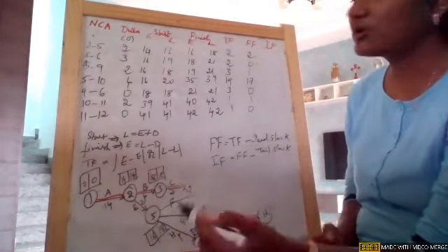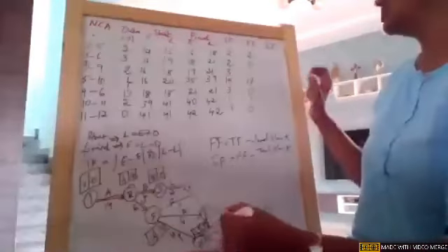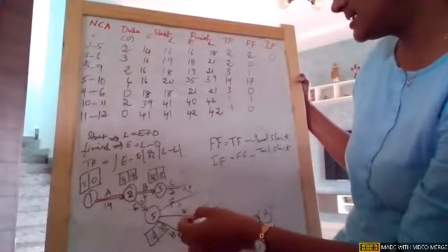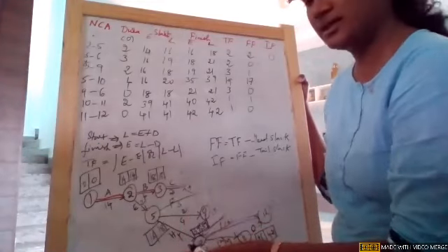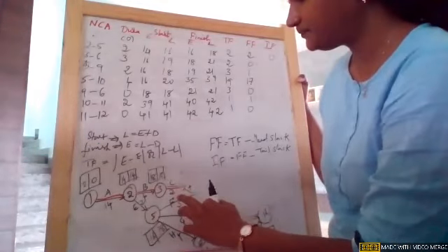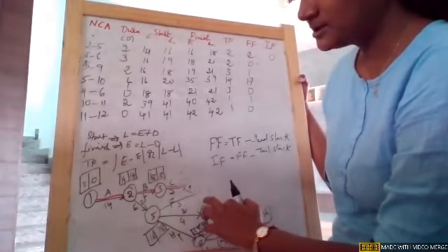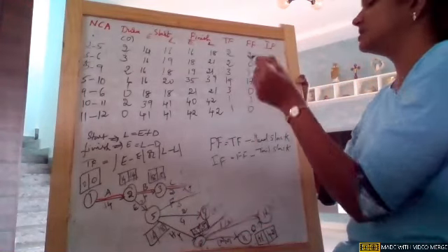So that is how. Now come back to tails. Now the tail on node 5, the slack is 2. So free float 2 minus 2, it is 0. On node 6, I think it is on the critical path. Tell me the critical path. Okay, so it is obviously 0. So 0 minus 0, it is 0.